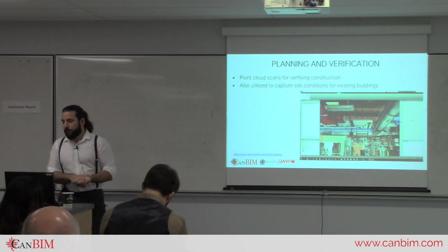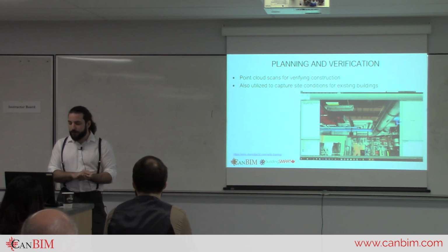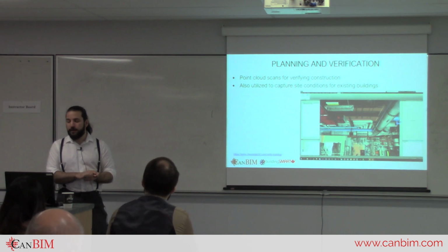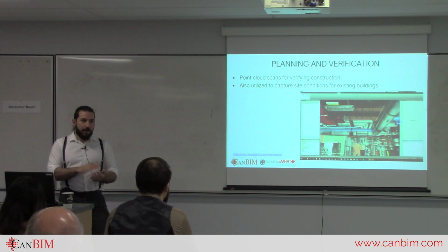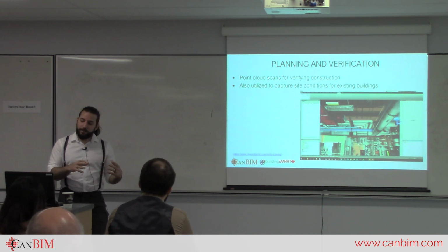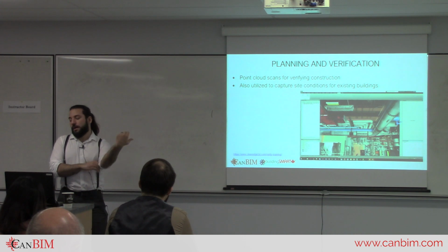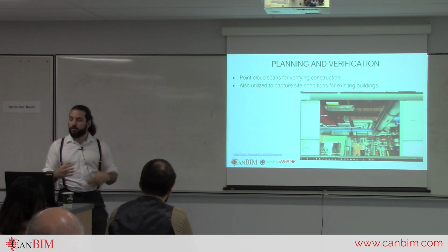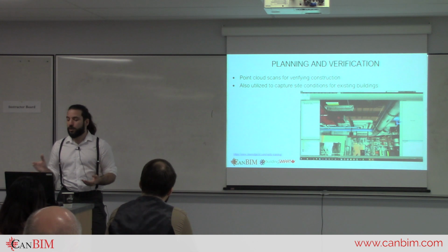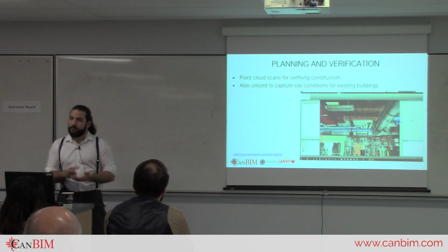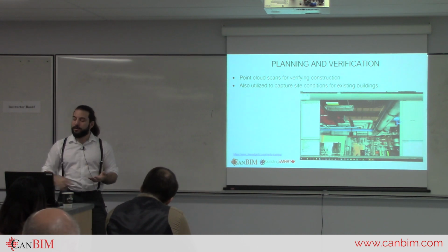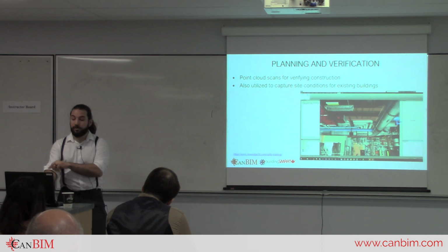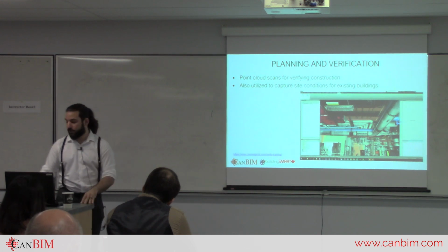Besides this, there is specialized software that will check your tolerances when constructing things. Let's say you put up the structural systems, then you can compare that to your model. Contractors do this in different stages of construction, from the establishment of the structure to the end of construction, to see how they're progressing and how accurate they are being with the implementation of the design.